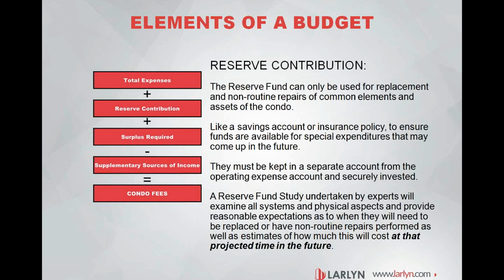So when a reserve fund study is done, it identifies the replacements of the common elements that have already been in place for the corporation over the next 30 years. The cost at the projected time in the future will take into account inflation.